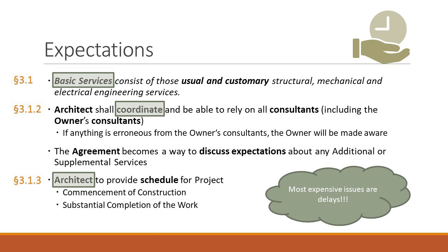In addition, though, not only shall it coordinate, but it shall be able to rely on and not be responsible for the accuracy and completeness of the information performed or furnished by the owner's consultants. So what this says is, okay, you're right. I know I'm not doing the kitchen, and I've got to work with Stephanie and her team. But whatever they give me, it better be right, because I'm relying on them.